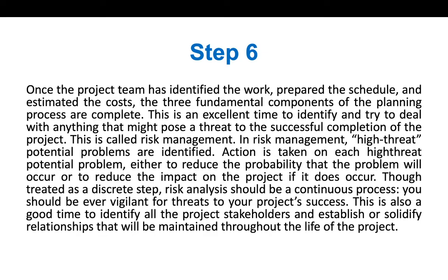Why risk management? Risk is something which will happen and it can affect your project. For example, there is a construction work going on, and they plan to complete that construction work in 6 days. But suddenly on the third day, there was a very heavy rain, and due to the rain, for 2 days they can't work.